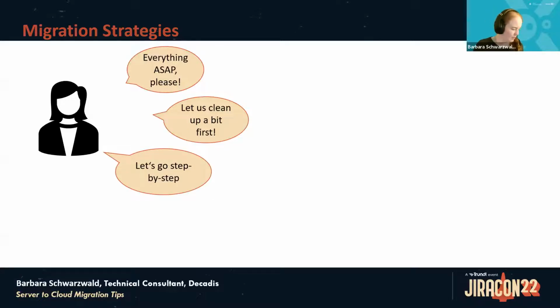Another thing, especially in big environments or environments where the user base is not that open to change, there might be a big motivation to do it in phases, step by step. Maybe migrate a single project first as a pilot migration project, so that some experience can be collected in the cloud in daily business over a while before the rest of the instance is migrated.